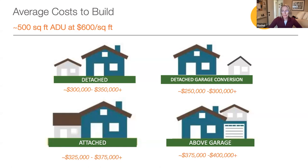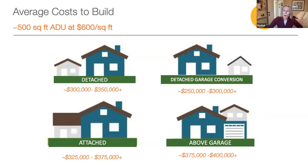The good and bad news is that people want to live here because it's wonderful. So turning back to development costs: detached ADUs tend to be less expensive than attached units of the same size, because they do not have to deal with any of the existing structure where you must tie into walls, roof, and foundation. The price goes up by about $25,000 to account for the greater complexity of these projects. Adding an ADU over any structure also adds costs as the weight of the additional load must be structurally supported.